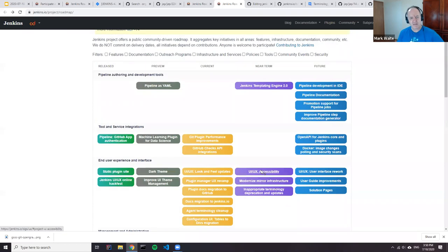Okay, so between future and near term, the transition happens when somebody declares intent to work on this initiative in the short term, or when we know that something is planned and there are experiments. Basically, it's a declaration of intent. Then from near term to current, when the work really starts, for example, when there are repositories, first pull requests created, and ongoing developer mailing list discussions coordinating the effort, then it's in progress or current.